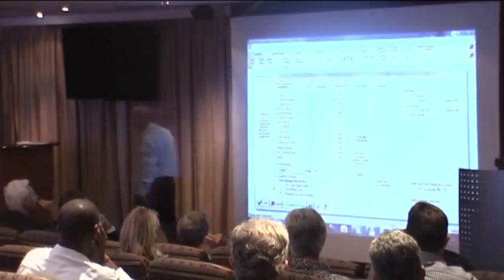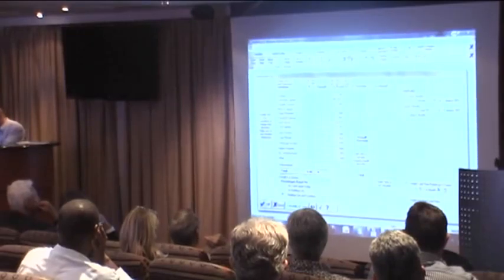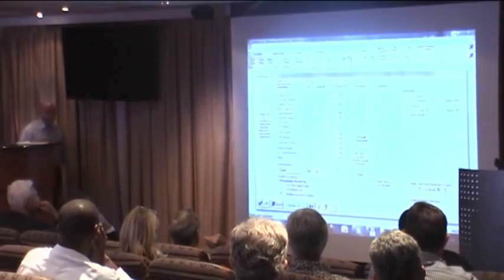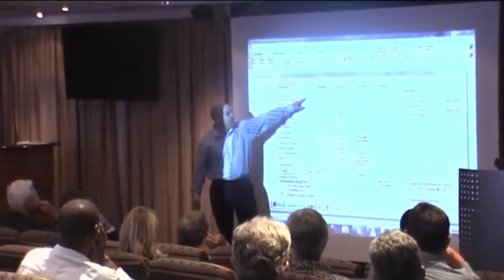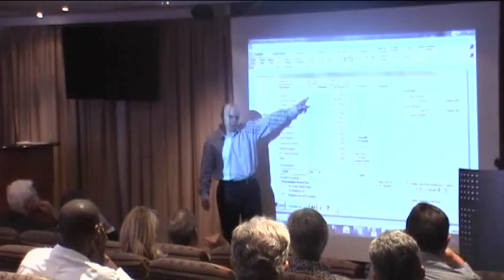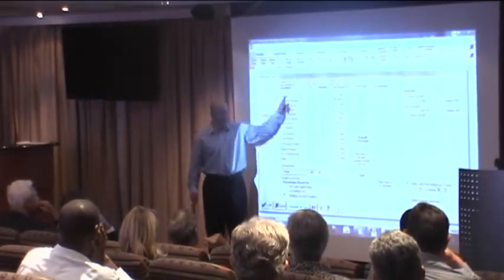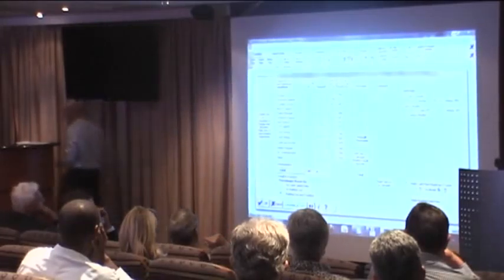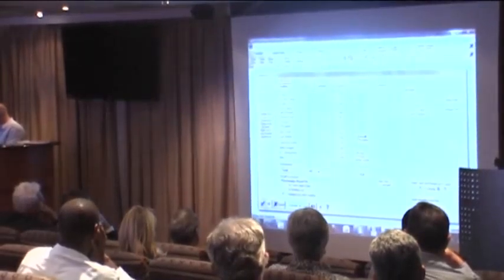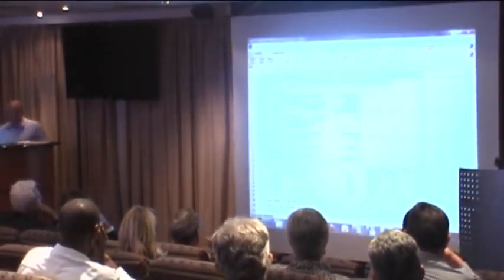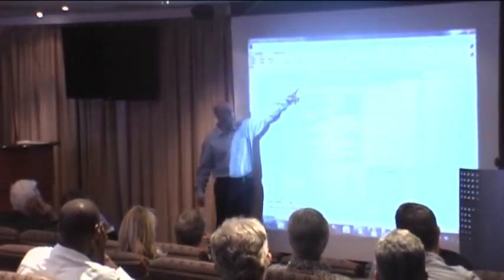So you literally right-click in that field, and the system will interrogate the tariff and calculate and says, based on that value of work of 23 million, his fee as per Gazette is 7.05%. If I want to see how that is made up, I double click on Architect and it's going to give me the breakdown. So I right click on Architect, and there is the breakdown in terms of the latest Gazette Board Notice 173 of 2010.